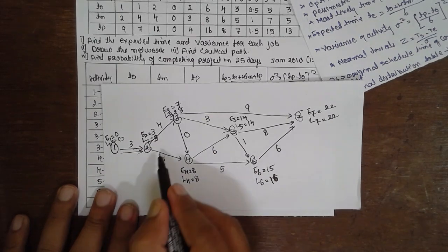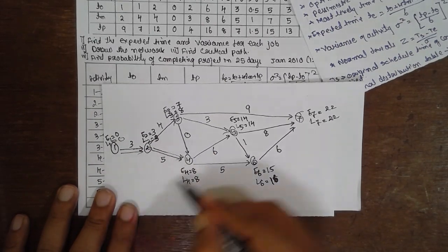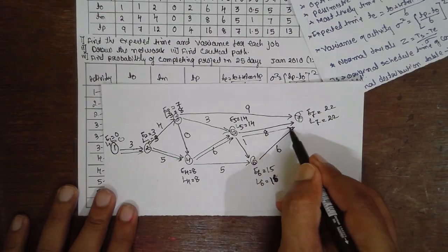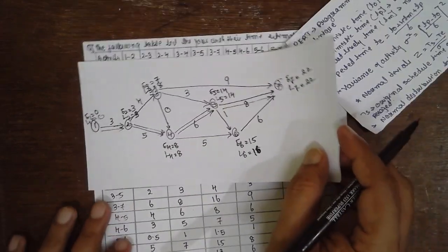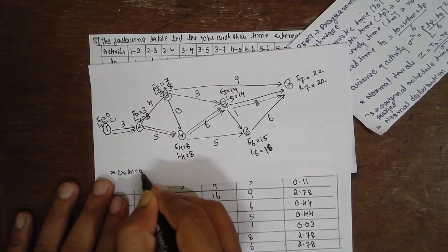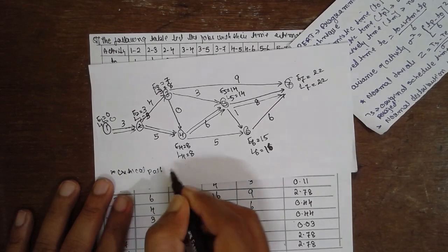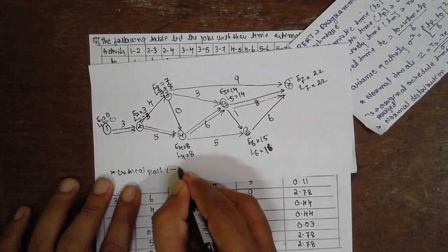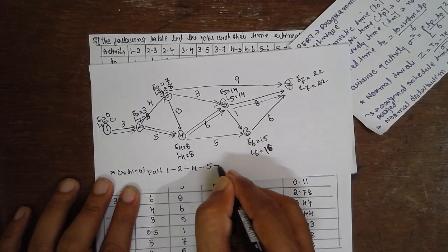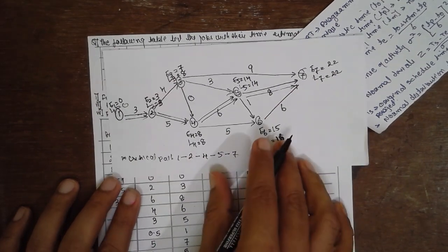Go for the critical path here. 3 and 3, 8 and 8, 14 and 14, 22. This is the critical path. Critical path: 1-2, 2-4, 4-5, 5-7. This is the critical path.